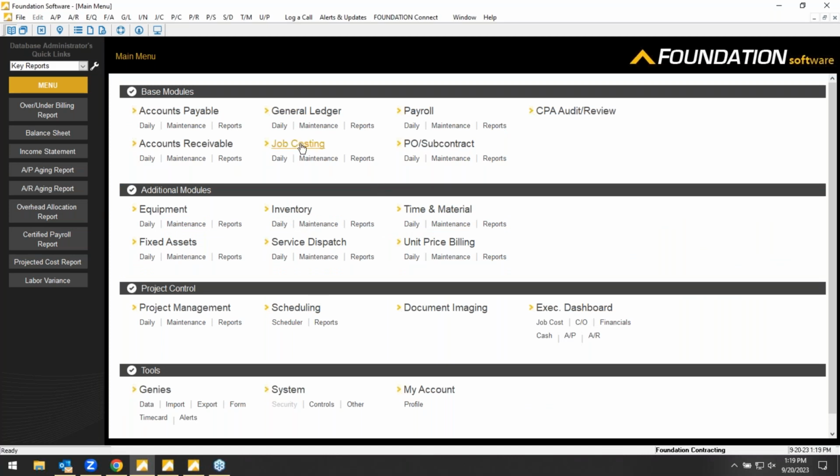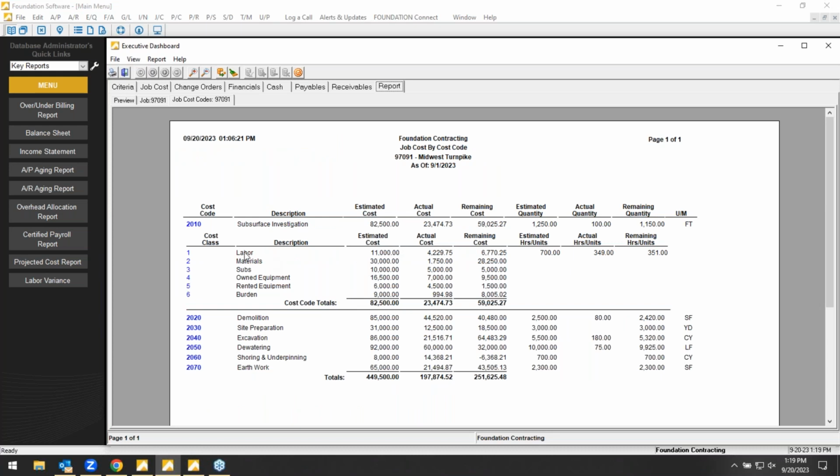All right, so we've set the job up, we've allocated our cost codes, we've entered our payroll to get that labor in, and just as a quick FYI there, for anybody that may not have seen that, we allocate both the raw labor and the burden to the job. So however that time card is coded to the job and to the cost code, that burden will follow the labor. Another example of accurate job costing, we're not just guessing at burden rates here. We could help you build workers' comp rates and unemployment rates and FICA that you're paying as an employer, prevailing wage fringes, union fringes for any union contractors that are out there.